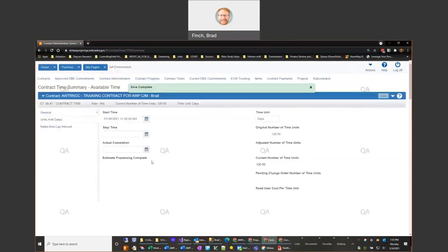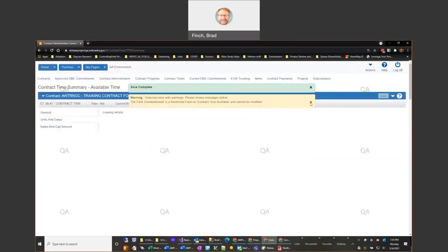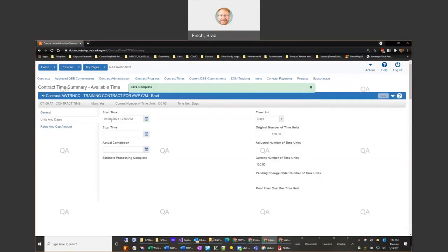And there's a definite pro tip for you guys here too. When the contract is first activated, we usually have an estimation that the construction office has put in here. They may have put an initial start time, but of course we know that that changes on a regular basis. When you are actually filling out your diaries for the first time, you'll want to note that you don't have to actually create a time entry on your diary if there was work done on the contract prior to this date.